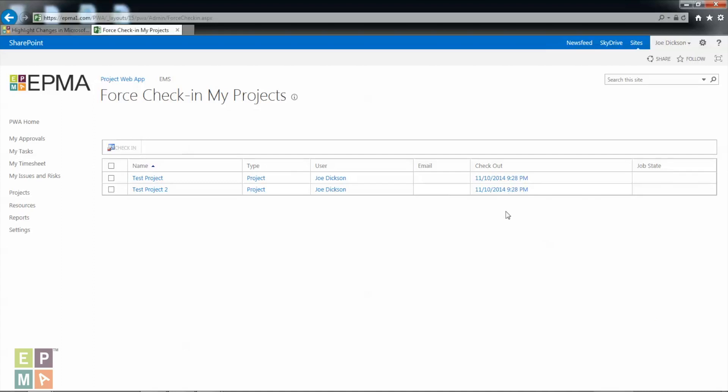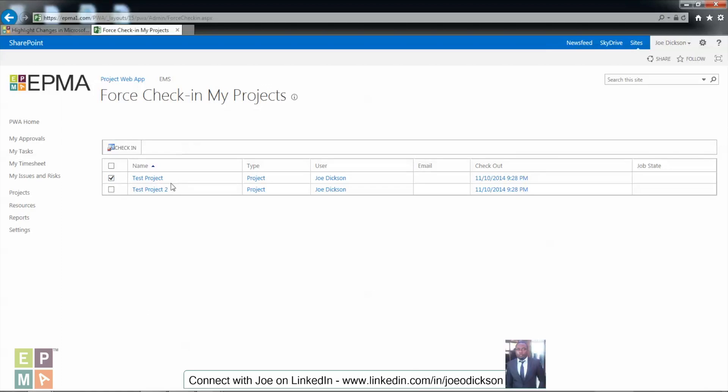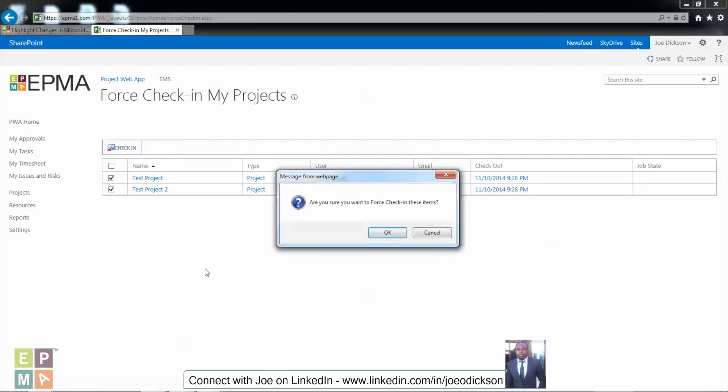Have in mind that you can only force check in schedules that are checked out to you. So what I'm going to do next is click the schedules that I want to check in. I'm going to click this one or let's just force check in both schedules in this case, so I'm going to click both of them and click check in.